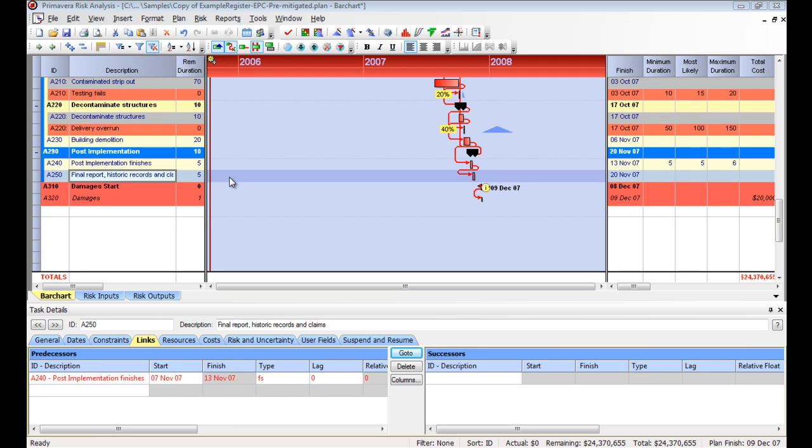We're in step 7 of the risk analysis process, so we've gone through the histogram chart. We've seen that we have an issue with the schedule. Management said they wanted us to be 80% confident, and we're going to be 206 days late. It's unacceptable. They said, hey, you can't even report that or we're going to fire you. You need to tell me how to fix it.